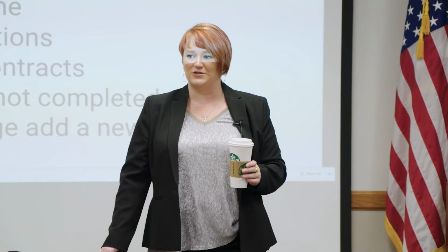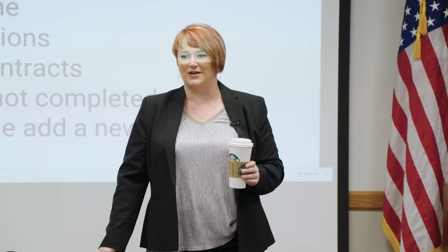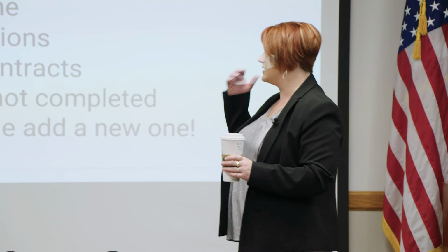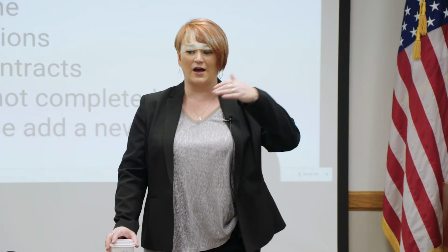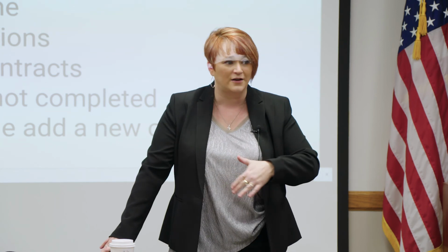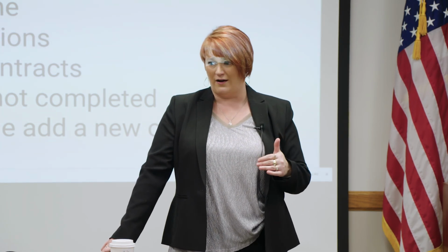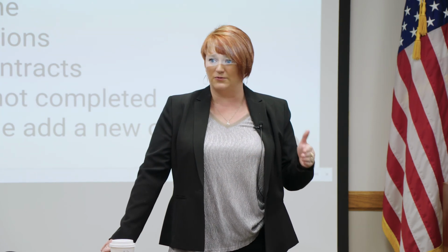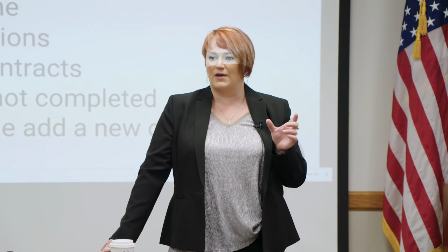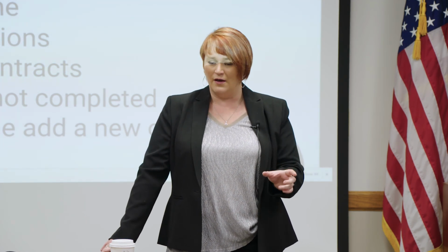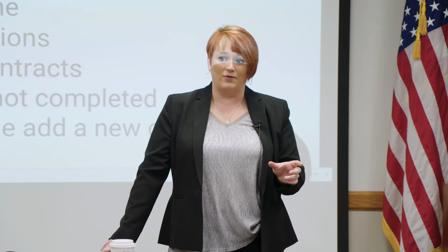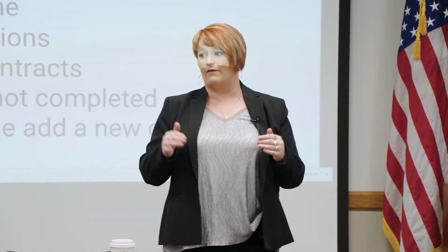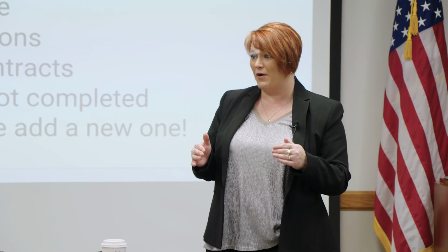You went, wait, and then they, I'm sure, had lots of customer service requests that day to change and settle on a new contract. So if you find that when you are looking at your contract expiration dates and your contract is expiring in March or February of that year, please have a conversation with your provider and find out if they will extend your contract those 3 months to get you to June 30th, or if you need to sign some kind of an addendum with them to cover those 3 months. Or if they absolutely are not going to do that, if you should be filing early. Because a lot of our contracts with our providers have small wording that you have read at one point, but now you've forgotten.